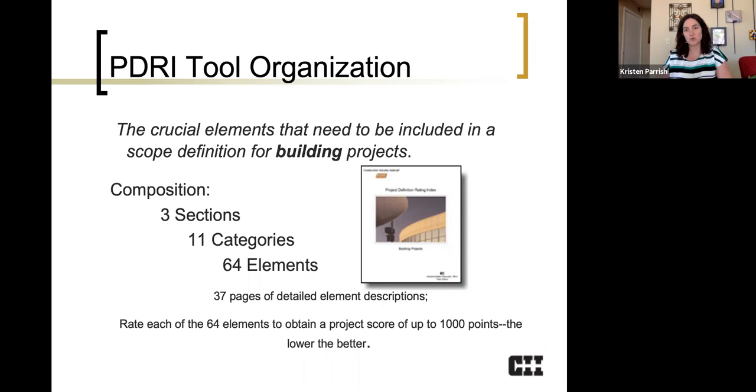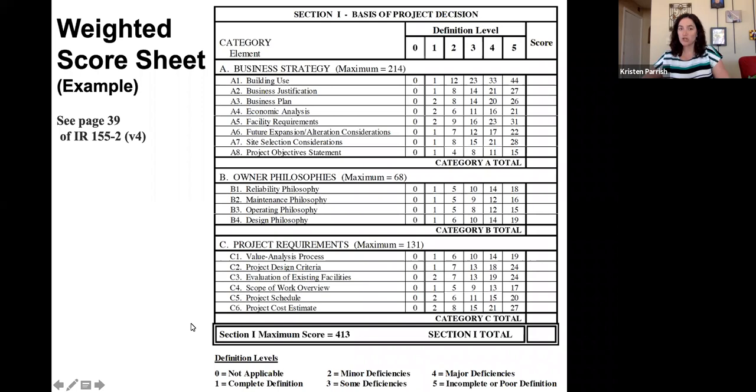So just to give an example of what a score sheet would look like, this is section one, basis of project decision. This is what the scoring would be for a building project. So you can see you have the section listed here. You have the categories broken out. In this case, it's A, B, and C. And then within each of these categories have a set of elements, and every single element has its own weights.